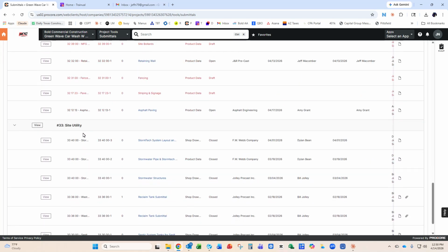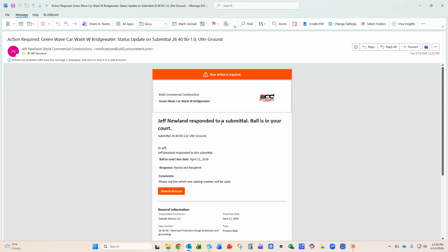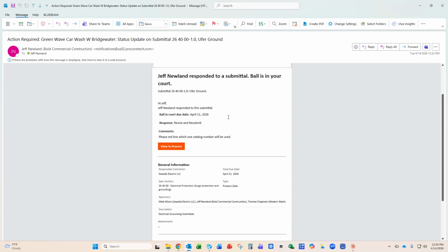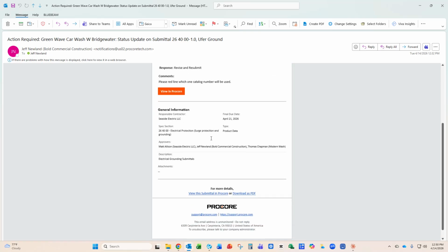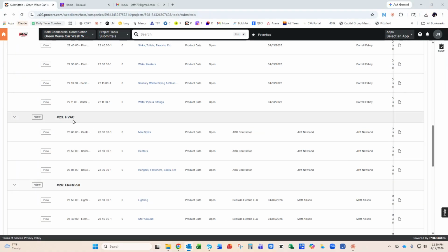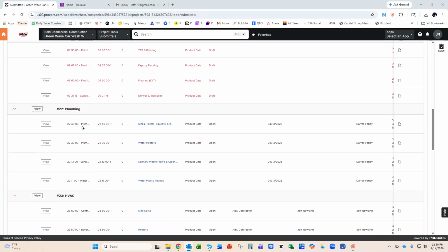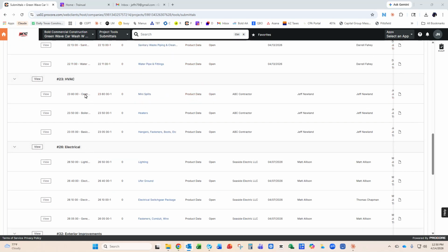Okay, well, you're not really concerned with that because you probably have gotten an email from us that says something similar to this, something about the ball being in your court, you've been assigned a submittal, it'll have your information on it, and this actually will come from Procore. So in this case, I am an HVAC subcontractor. You can see that all of our submittals are broken up into packages, and all of our submittals for the HVAC are in the HVAC package. So I can look here, and as ABC contractor, I owe a submittal for mini splits, I owe a submittal for heaters, and I owe a submittal for hangers, fasteners, and boots.